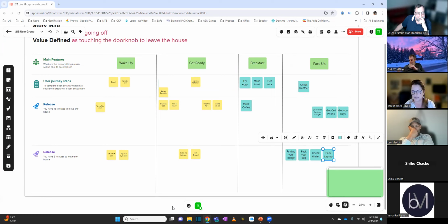And here is the big thing to take away: the titles of your stories should be descriptive enough that anyone reading the title will have an understanding of what the outcome is. They might not know the details. Oh, do you eat your eggs over easy, sunny side up, scrambled? I don't really care. I know I'm going to have to fry eggs, and they all take about the same amount of time, right? And so if you have good descriptive titles that describe an outcome, both your business users and stakeholders understand it, the delivery team understands it.